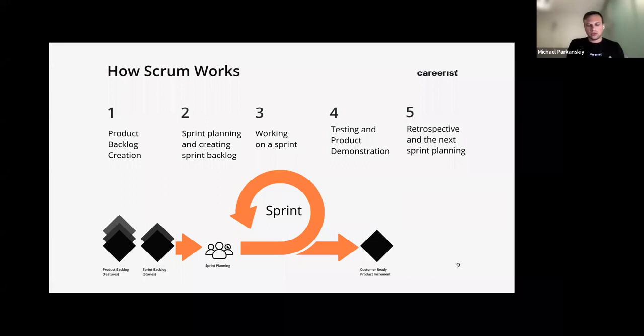You start writing test cases as soon as you get the product requirements, all the way until you get the actual product to test. And even at that point, most of the time, you're still going to be writing test cases because things might have changed throughout the development of the software.